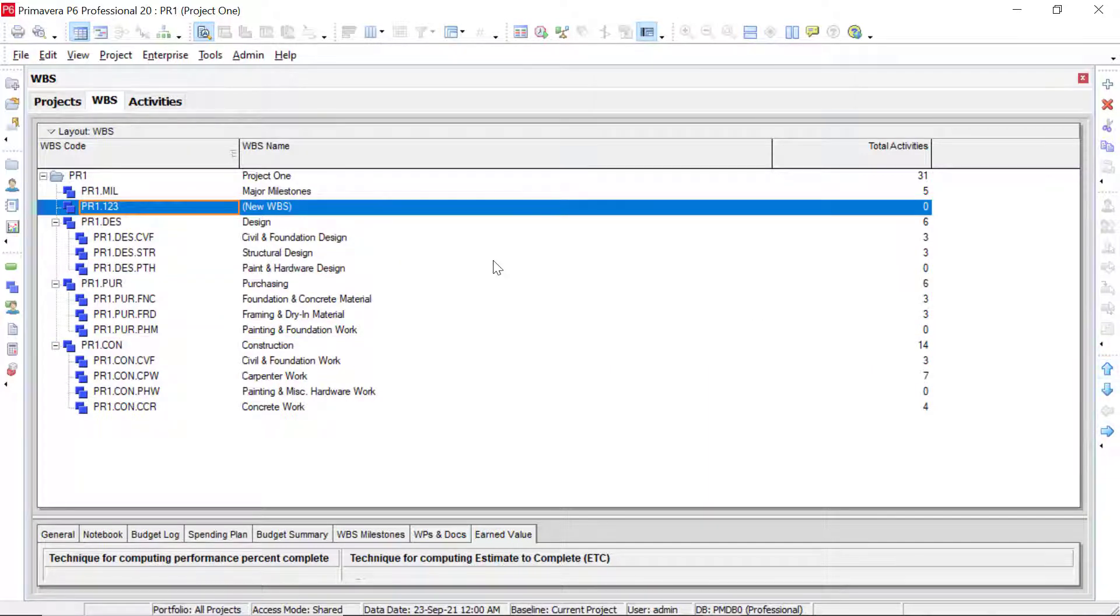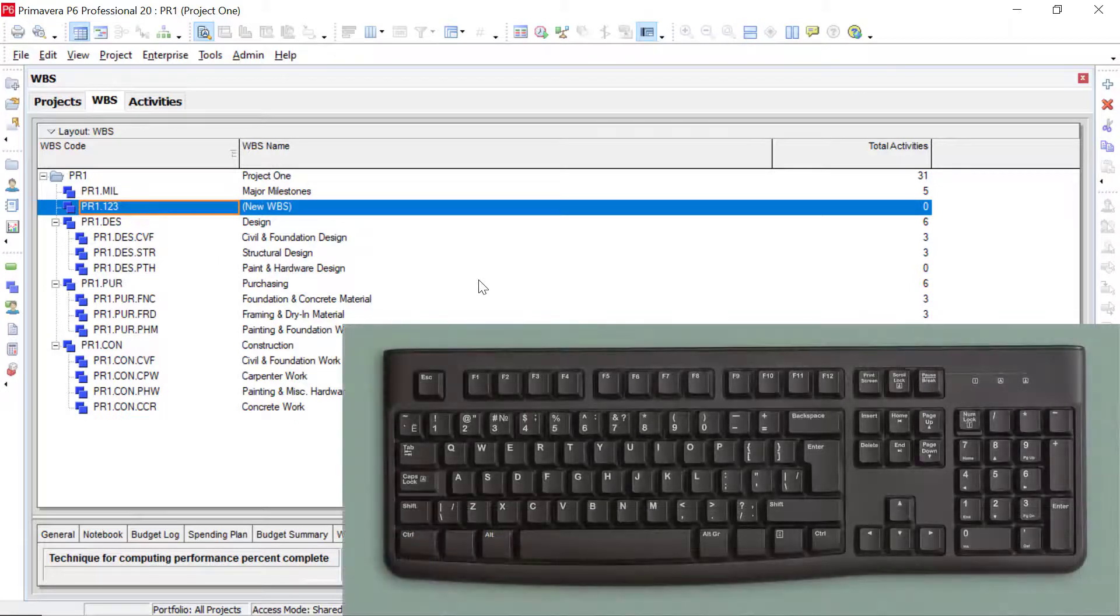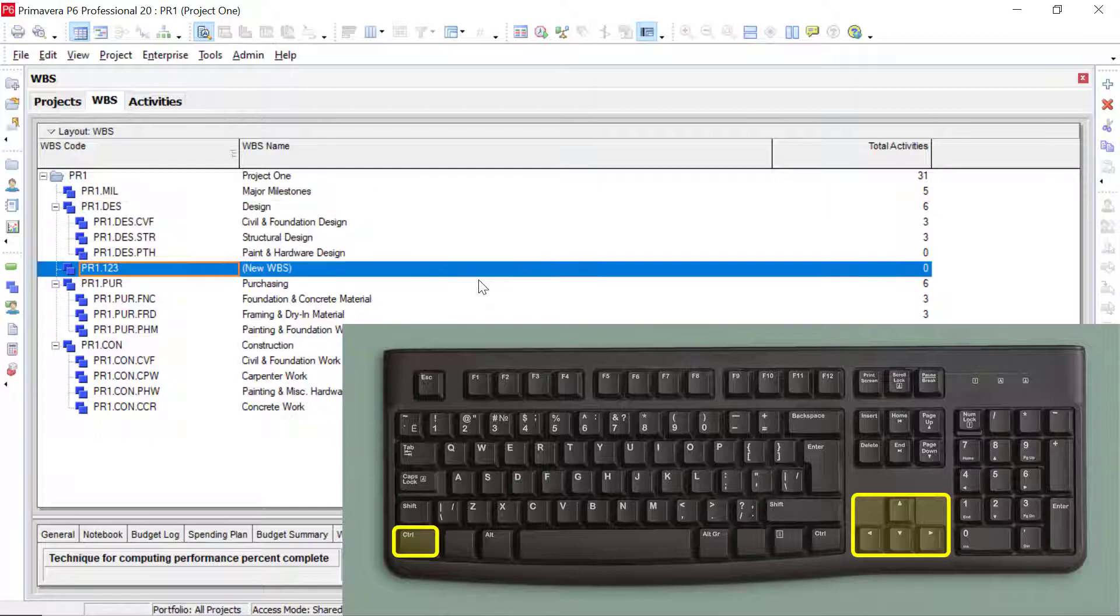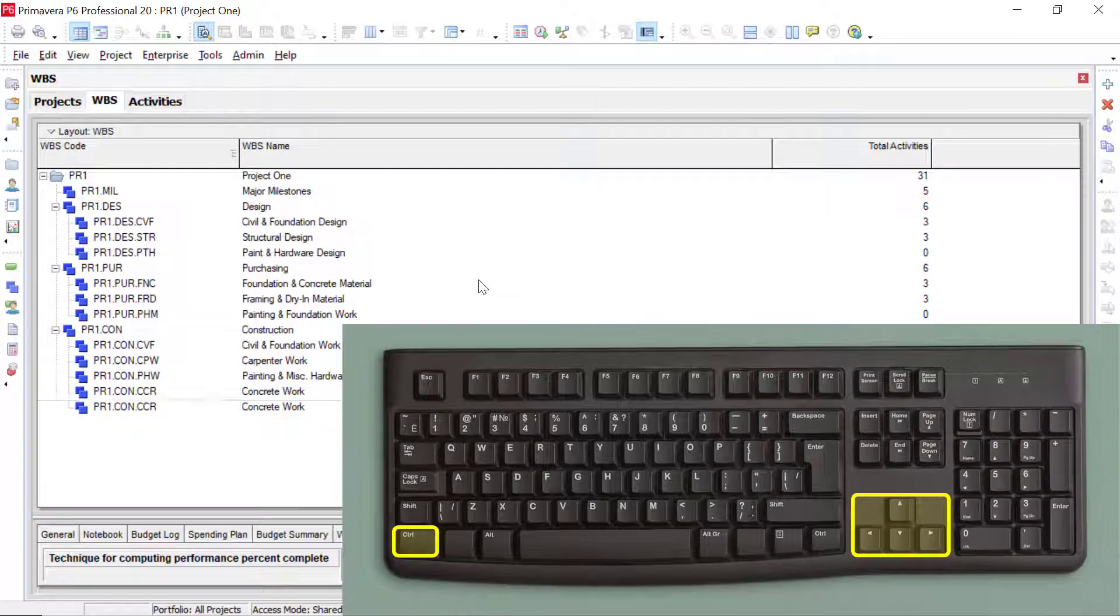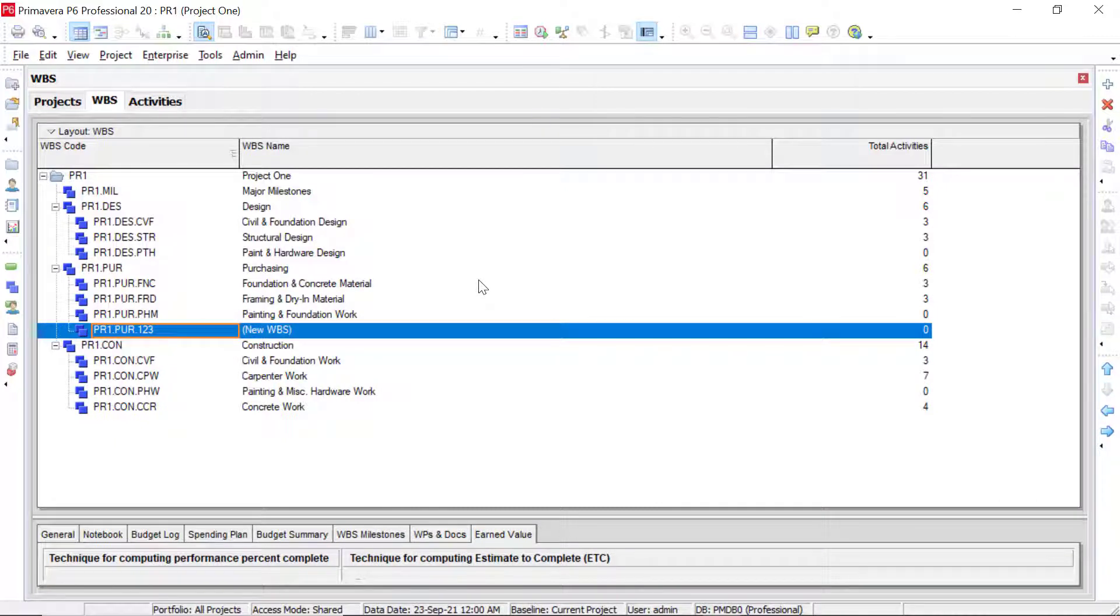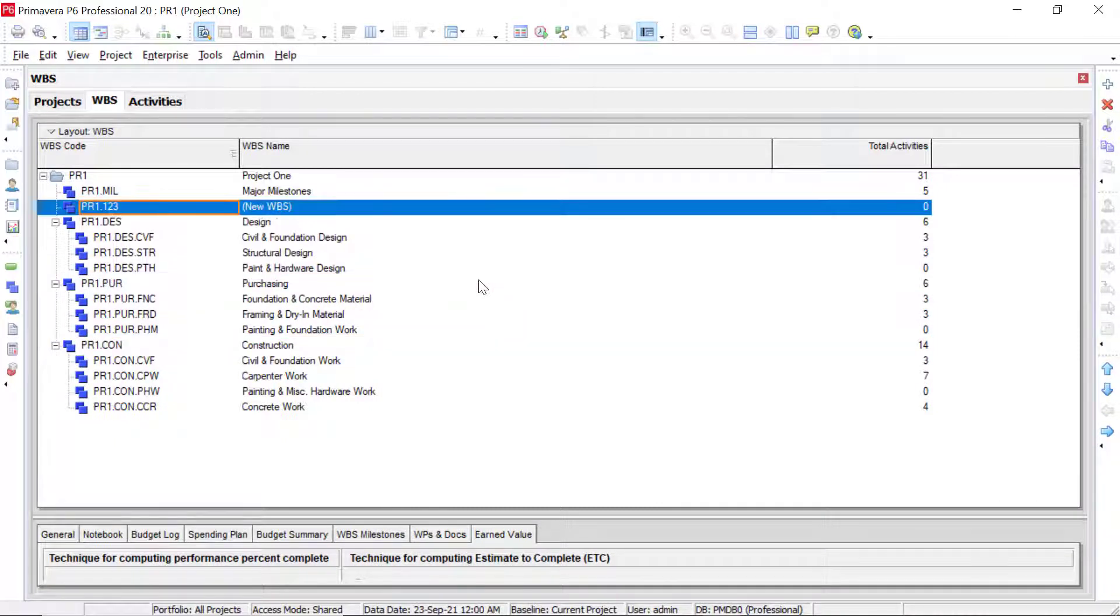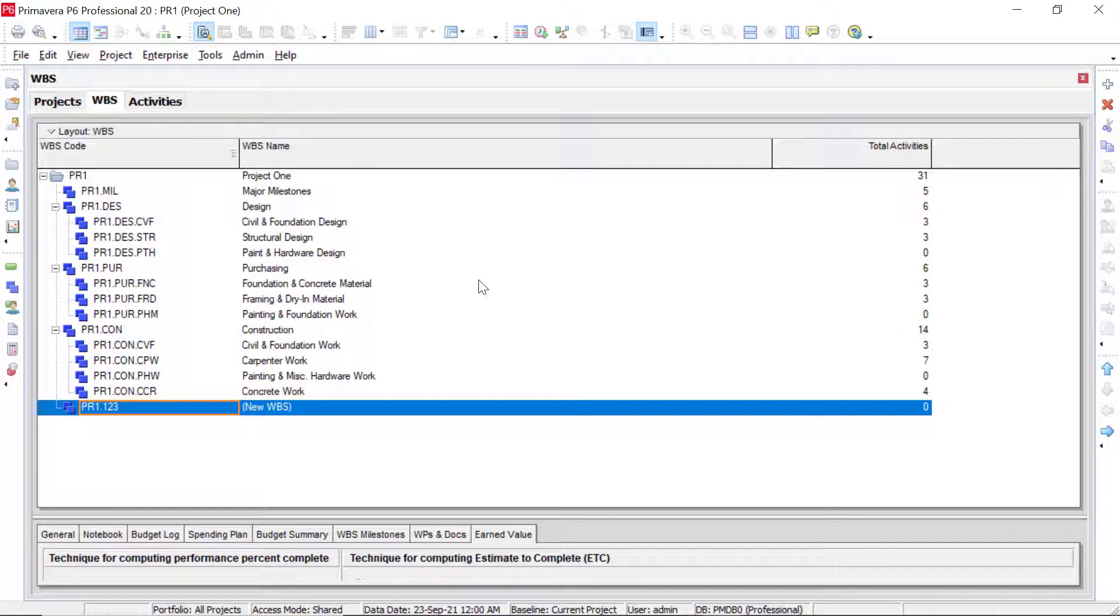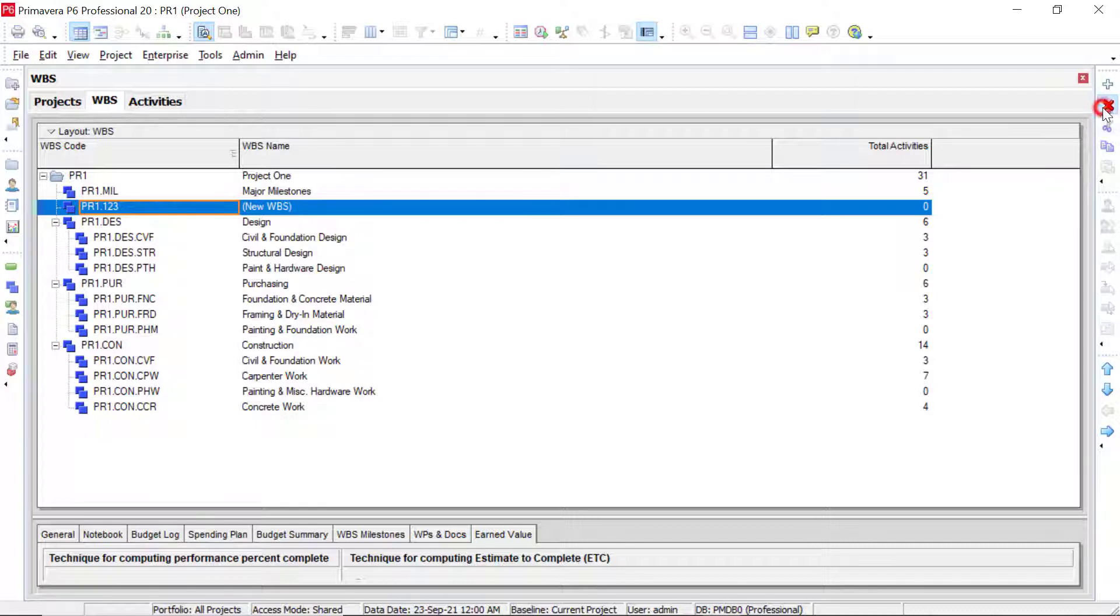Another way that we can move these items around is by holding control on your keyboard, and then using the arrow keys to move that around. So I'm holding control and just moving it around within the WBS.